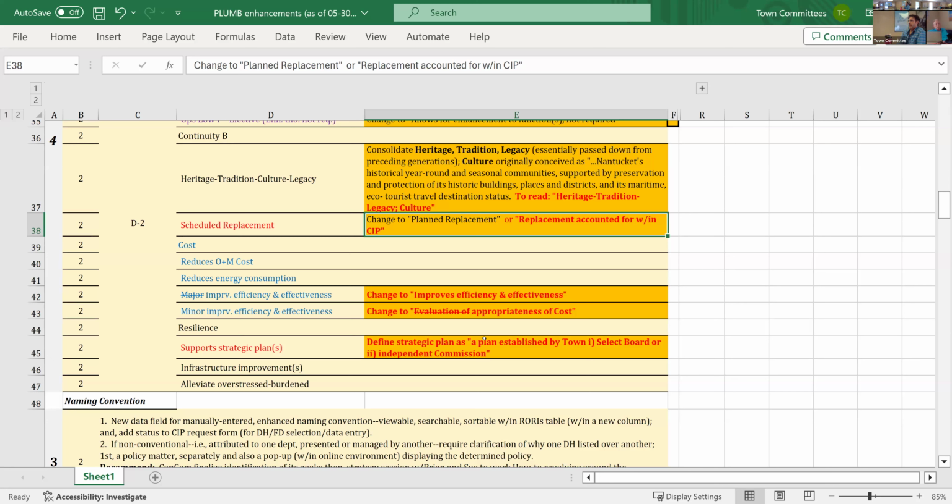So in that instance, they come in 2023, they have a vehicle every year. Let's say they have 4 vehicles that are the same vehicle type, make, model, and the rest. Each year they're coming in and requesting one of those vehicles. It's a new request, but it's going to score 100 because they put it in the SIP. Now, somebody else might come in with the exact same vehicle, and we only have enough money for one vehicle that year, and they didn't put it in the SIP. Their score is going to be lower by a function of this having received a 0. The idea being it incentivizes proper, future planning.